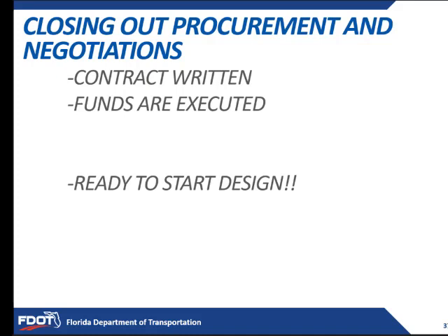And that final step is the contract is written and all those design funds that you've planned for, that have been part of the CAP, can now be executed. You can encumber them and you can start writing tasks, or you can give the consultant the notice to proceed with the work. So the exciting part is you're ready to start design. You're ready to start seeing the change.